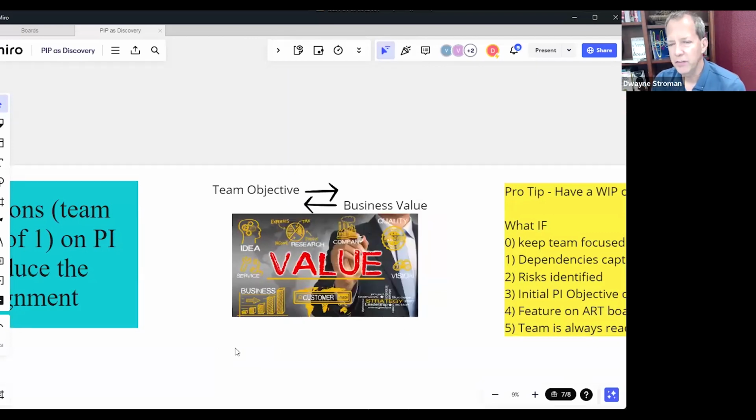And having the conversation early, as you probably are aware, Scaled Agile recommends that during the second breakout, day 2 if you're on the calendar dates, about the middle of the second breakout, we get the business owners to go around team to team and have a conversation about their objectives and what business value, number 1 to 10, do the business owners think that would deliver.